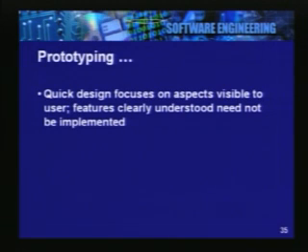So, we do not want to spend too much time and effort as well as resources in building a prototype in too much details. We want to do a quick design, and in fact, those features which are, let us say, clearly known or clearly understood need not even be implemented. So, in the case of prototype, the focus will be on what is unknown or not properly understood.